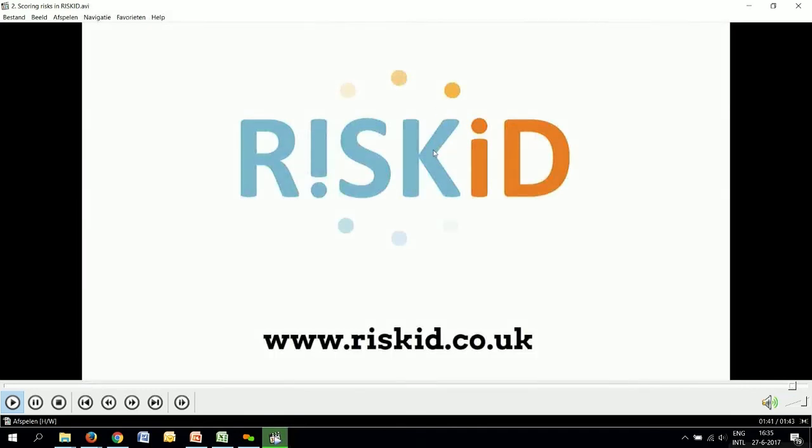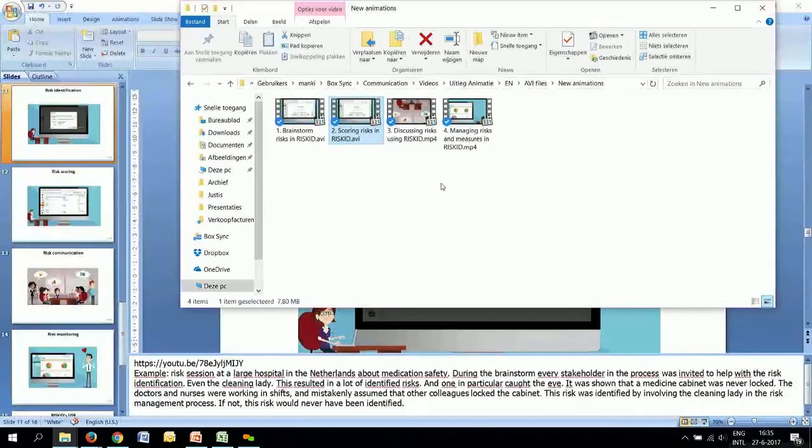So this second step where you involve stakeholders is for them to score the risk on probability and impact. And here already a process of risk awareness occurs, because you not only score your own risk, but also the risk of your colleagues. So you will need to read all the risks and you become aware of what risks my colleagues see for this project or process, etc. In this sense, you can also give your opinion on each risk, why you scored this.